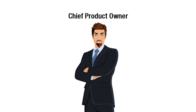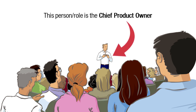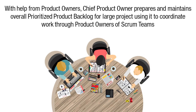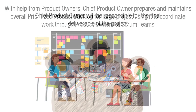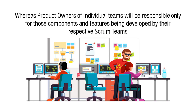The first role is Chief Product Owner. In the case of large projects with numerous Scrum teams and multiple product owners, it is still necessary to have one single person who makes the day-to-day business decisions. This person, or role, is the Chief Product Owner. This role is responsible for coordinating the work of multiple product owners. With the help from the product owners, the Chief Product Owner prepares and maintains the overall prioritized product backlog for the large project, using it to coordinate work through the product owners of the Scrum teams. The Chief Product Owner will be responsible for the final deliverable of the project, whereas the product owners of the individual teams will be responsible only for those components and features being developed by their respective Scrum teams.